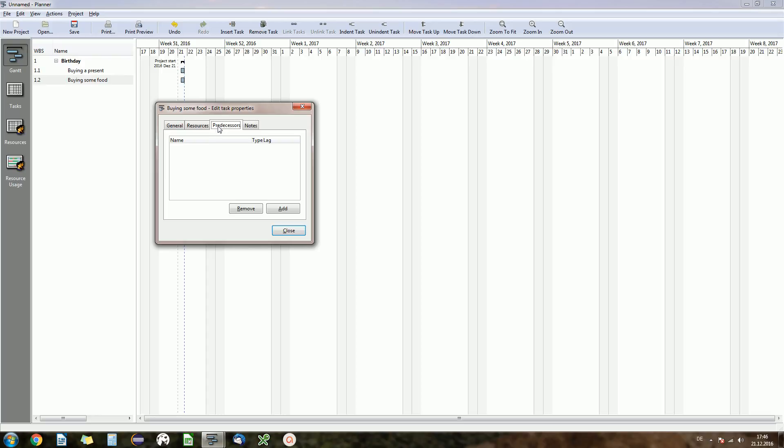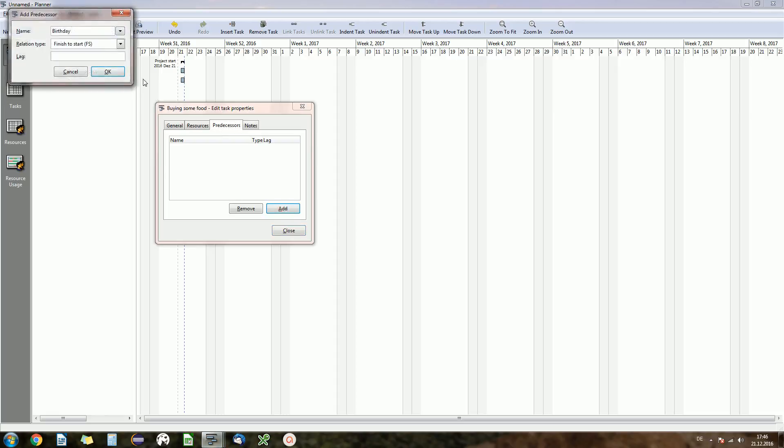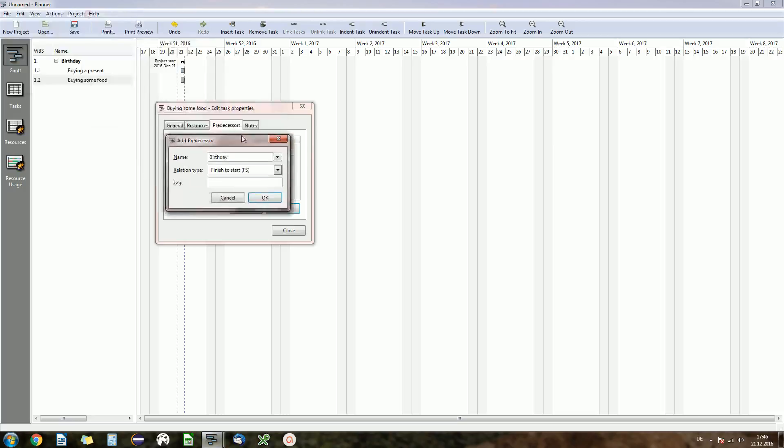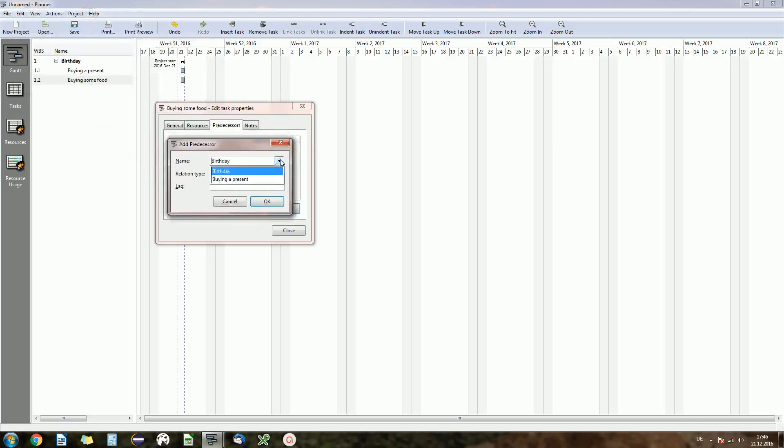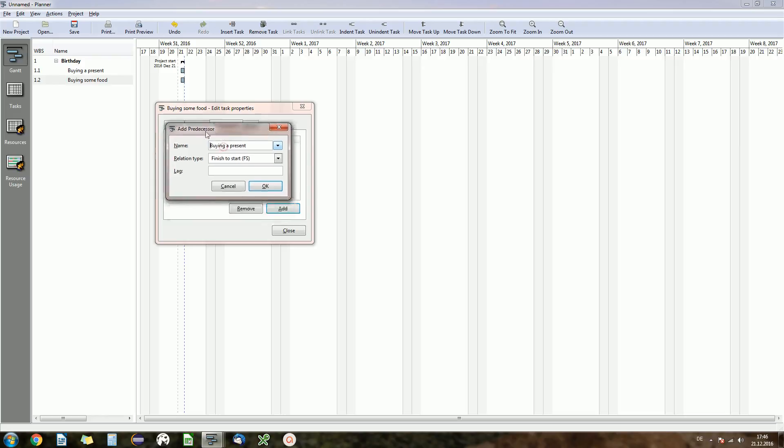Predecessors, that's exactly what I said before. You want to say which task is the task before the current one. So we are on buying some food and now we want to add a predecessor. And we say that's buying a present and the relation type is finish-to-start. That means exactly what I said before, the predecessor has to finish before our current task will start.